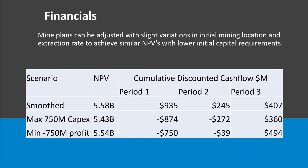In period two, we're down to negative $39 million — almost at zero. In period three, we're at $494 million positive. If you look further into the mine life, the smooth and the min-750 do hit some worse cash flows later on — that's why I was preferring the other option when we first solved. But we have essentially gotten the same NPV, and even a little less is acceptable if it means I can get the loan from the bank without too much of a headache.